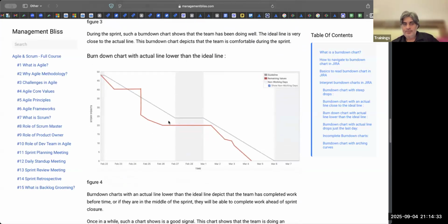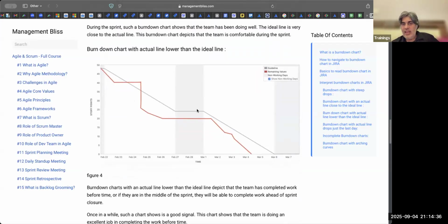Now, if you look at this chart, this gray line is the ideal line of work. This is like if in a 20 over game we are chasing 150, the ideal rate is that we make 7.5 runs every over. But we are not going to make 7.5 runs every over, right? So if an over goes where you score more than 7.5 runs, that is below this line. If we make only 5 runs, it will be above it. So this is just an indication of your ideal run rate kind of scenario.